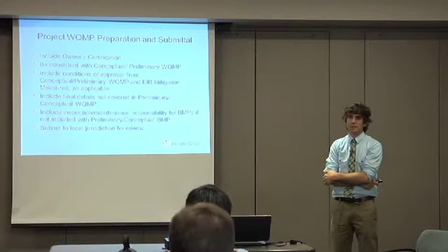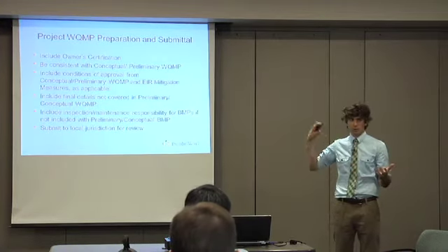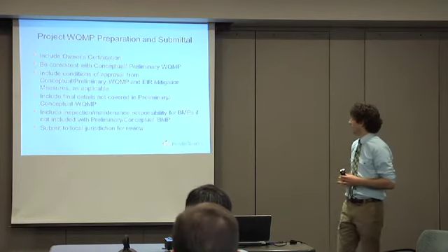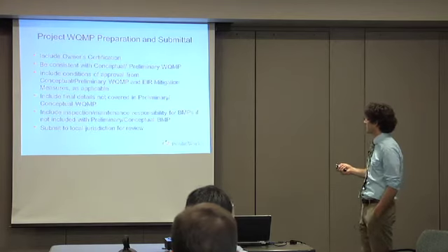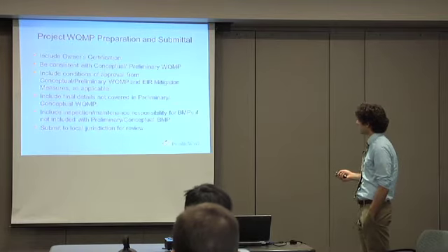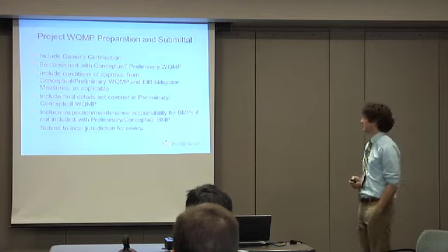And that's not a problem. It's just that their progression from conceptual to final is going to be much more significant. They're going to have to then, at the final, maintain the consistency with the overall project description that was described in the conceptual, include the conditions of approval, and then add a lot of final details that wouldn't have been covered in their conceptual submittal.